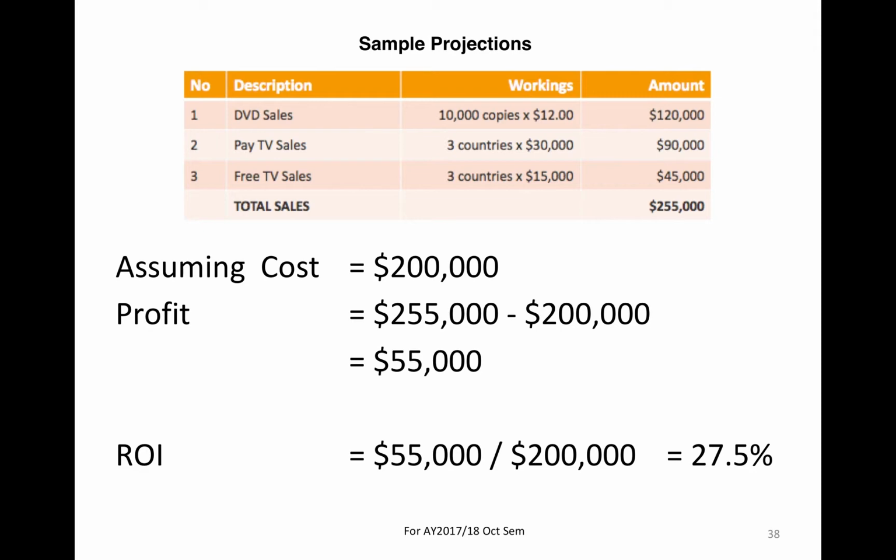One thing I want you to take note of in budgeting is that you do not budget as precisely as possible. Let's say you're going to buy food. You don't go to the hawker center and see that one plate of duck rice is 350, and then come back and say, okay, I have a crew of 10, so I'm going to budget 350 times 10. No, you have to mark up a little bit from 350.